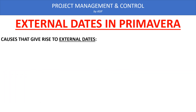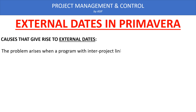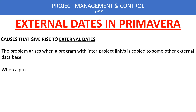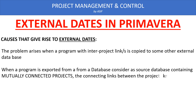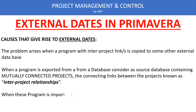Now we see the causes that give rise to external dates. External dates are generated when a program is linked with another program in the same database. When we copy this program from the source database to some other database, these inter-project links are converted into external dates as constraints. So the main cause of generating external dates is these inter-project relationships, which are sometimes ignored and missed by us — a negligence by the programmer.